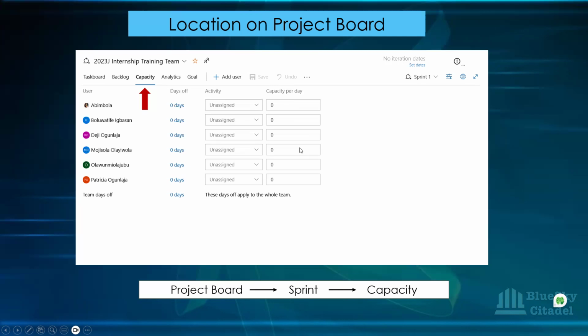But remember, because you've done the spreadsheet one, you've removed the Scrum events, which Azure DevOps won't do for you. You've removed the other meetings, which again Azure DevOps won't do for you. I know that, and I said the other meetings are a varying factor, so it's not something that happens every sprint. It's not like the fixed meeting. So in a sprint where there are no meetings, then they are available, their capacity per day would increase. Yeah, but you've factored in the times they are off here.